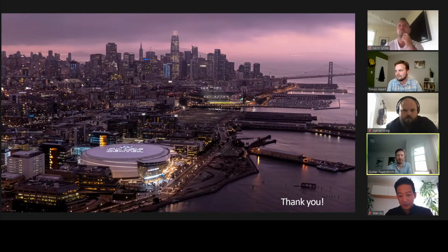Okay, I think Stan and I agree on this, but we'll see. As Kevin knows, we will always advocate for design assist when we can, meaning to have a capable and suitable fabricator on immediately who can advise on solutions that are directly compatible with their capabilities, whether they be, to Kevin's point, the scale of operation, or mold making capabilities, or whatever it may be.